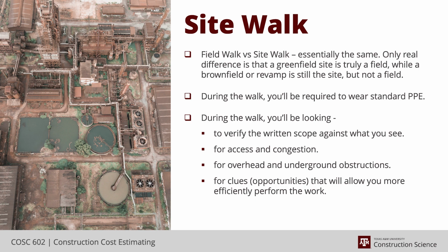acknowledging certain limitations. For example, we were bidding on a job here recently in Mozambique. The city of Palma isn't going to handle foreigners and hotels. So we're back to a man camp, and we're looking at probably 1,500 craft on site. It's right on the eastern coast of Africa. So under those circumstances, even though it was a wide open field, a blank canvas, we already had certain script written for us just by where the job was located and what was going to be needed.